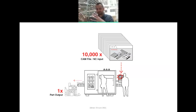So there's a huge innovation process in trying to figure out how to do this efficiently, because with 37,000 unique pieces of NC code, numerical control code, it would have added something like 30 minutes for programming on each of those files. That's a lot of time, so it was not doable like that. One of our engineers worked directly with Trumpf, coming to them with this problem. We were able to develop software where, through Grasshopper, we could produce code that Trumpf and their internal engineers could use to spit out thousands of programs in seconds that the punch could then process. It was a unique workflow that has not been done before, to my knowledge, that we had to develop to efficiently process this project.